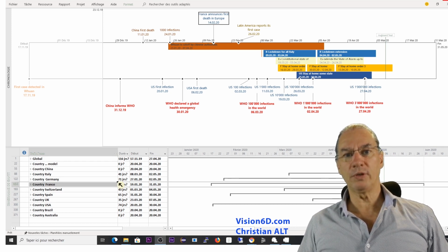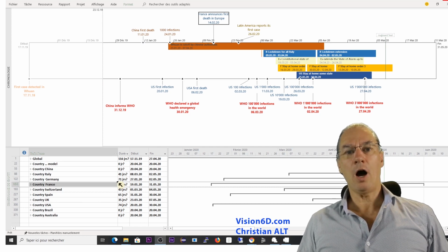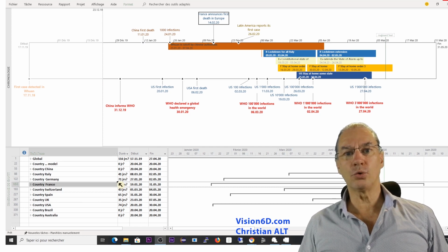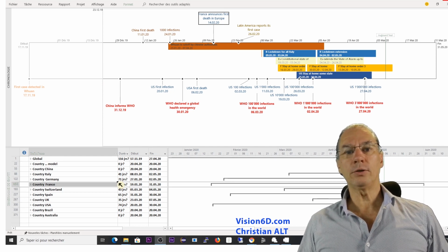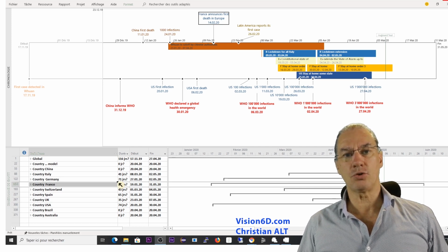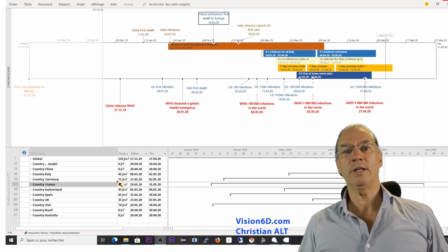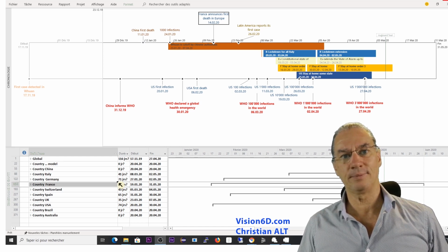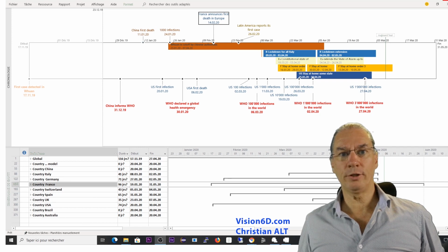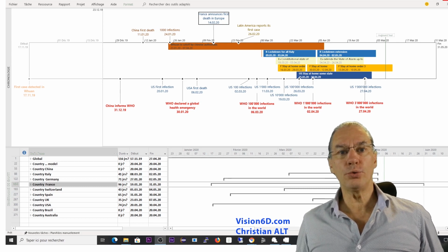So what you have to put into the presentation are points that you really master and decision points. Where do you want stakeholders to take decisions? Those are the important points that must figure into your macro planning. As a project manager, you will also use the macro planning with your teams, with customers or the users that you have at your company.